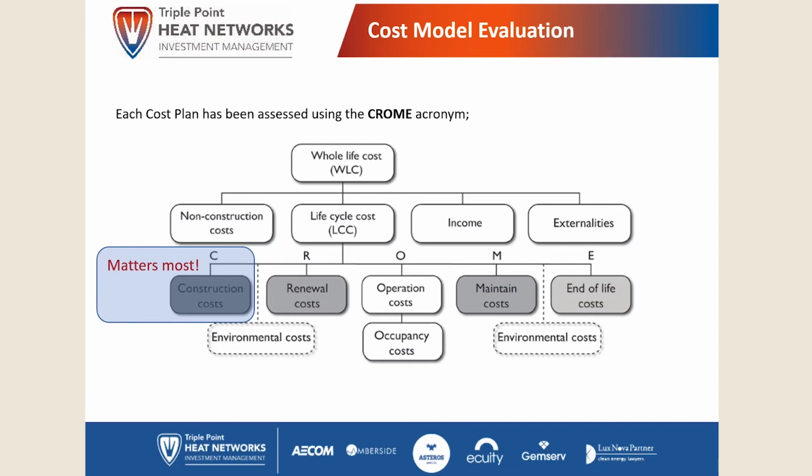Cost modeling is based on whole life cost of the project, with particular emphasis on the construction costs, because we're obviously supporting those directly with grant or loan, and we want to make sure that they're robust so that as you develop the project and get towards a final fixed cost, they don't suddenly come up with any large changes that could derail the project.